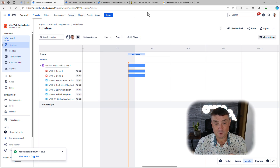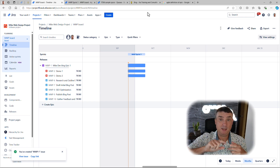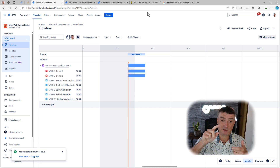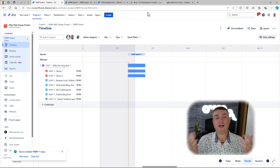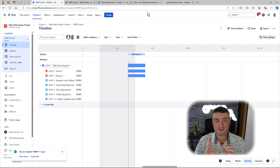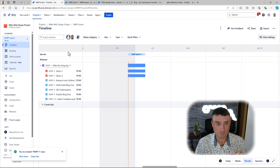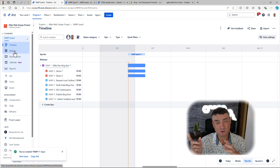By default, Jira supports up to three levels: you've got the epic, and underneath the epic you can have bugs, stories, tasks — whatever issue types you want. Under those you can have subtasks, but you cannot have a subtask connected directly to an epic. I think many years ago that was possible, but not anymore. The epic is a special issue type.